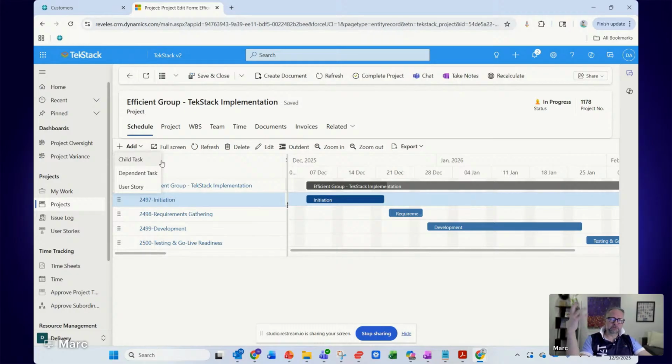So you might enter the project with a statement of work that has a rough estimation that I need, let's say, 25 hours for report design, 25 hours for adding new fields, but you don't necessarily know all the things that you're going to be adding. So you can use user stories to very quickly add almost like dependent tasks against an existing task. The big difference with user stories is they don't necessarily drive out the duration of a given task. They just nest within a task.